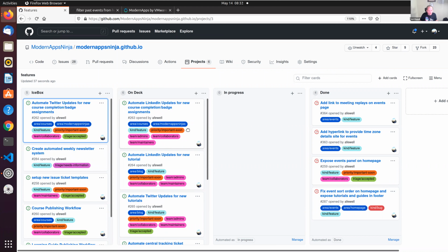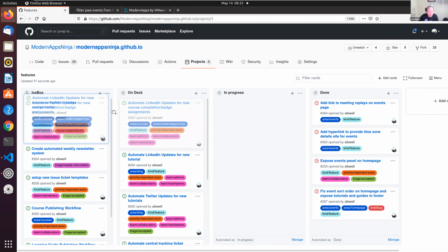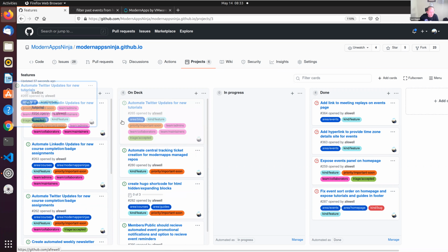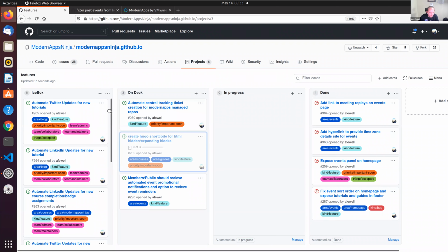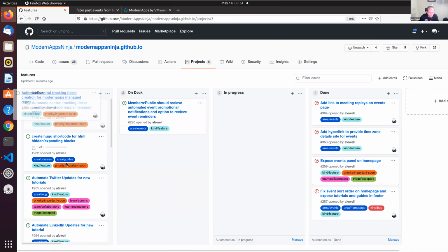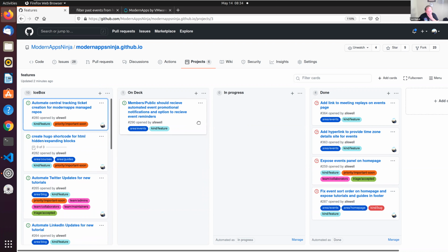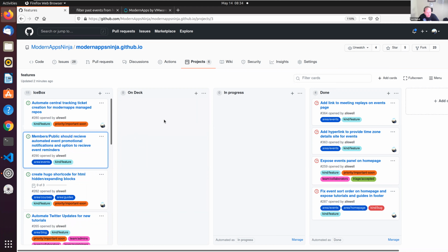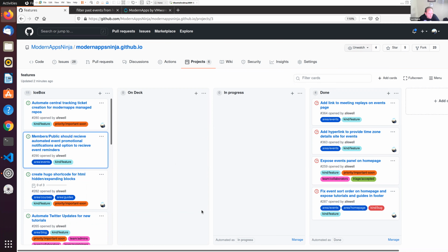we don't want, in terms of queuing theory, a priority queue that starves all other tiers of priority. So we might have something that is lower priority that we do want to push through ahead of a higher priority item. That's not always true, but this gives us some flexibility as a team when we're planning to really leverage the priority tickets and our standard priority and create sort of a weighted fair queue approach that allows us to handle different priorities differently.